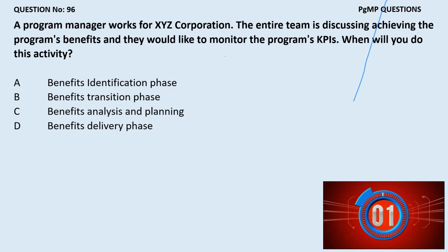Understood, sir. In the analysis phase, in the identification phase, I have developed the KPI that I will be checking every day. But I will monitor how you are performing once you start doing the work. That is in my delivery phase. D. Clear? Yes, clear. Yes, Abdullah?